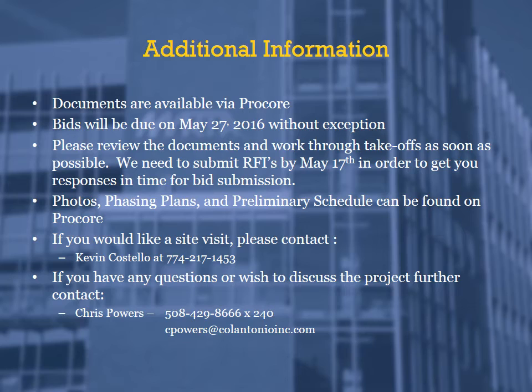So just some additional information. As you know, the documents are available via Procore. Bids are going to be due on May 27th without exception. It's really important that you guys get into the documents and start doing your takeoffs sooner rather than later, so that you can issue any RFIs and we can get them responded to in time for you to complete your bid by the date requested.